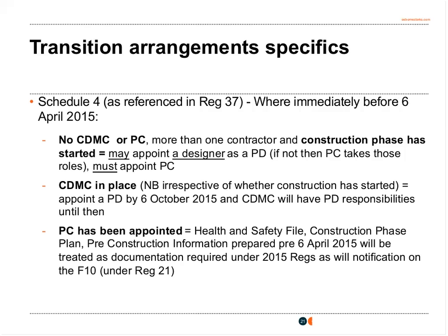So the type of scenario we're probably likely to be talking about there are projects that previously fell under the old notifiable threshold, so there was no need to make appointments. Then on those projects, there will be no need to appoint a principal designer, but you must appoint a principal contractor on or shortly after the 6th of April. And then on or by the 6th of October, all the requirements of CDM 2015 are going to kick in.